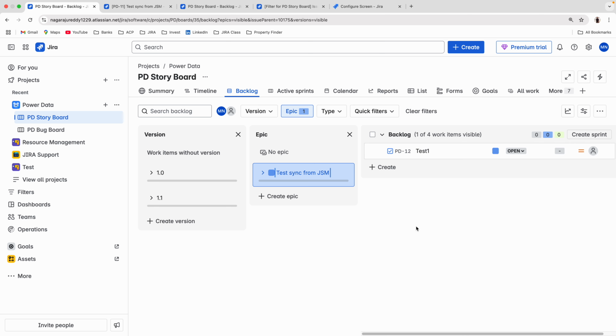But how are epics helpful? For example, at an organization level, we have quarter-wise releases: quarter 1, quarter 2, quarter 3, quarter 4, like that. Any tickets the organization works on, they will separate: within this quarter these tickets, or next quarter these. I will create this financial year 2026, or I can create 2026 quarter 1, quarter 2, quarter 3, quarter 4, and we can see all four in the epics. Under epic quarter 1, the tickets I create on the right side will be created there.